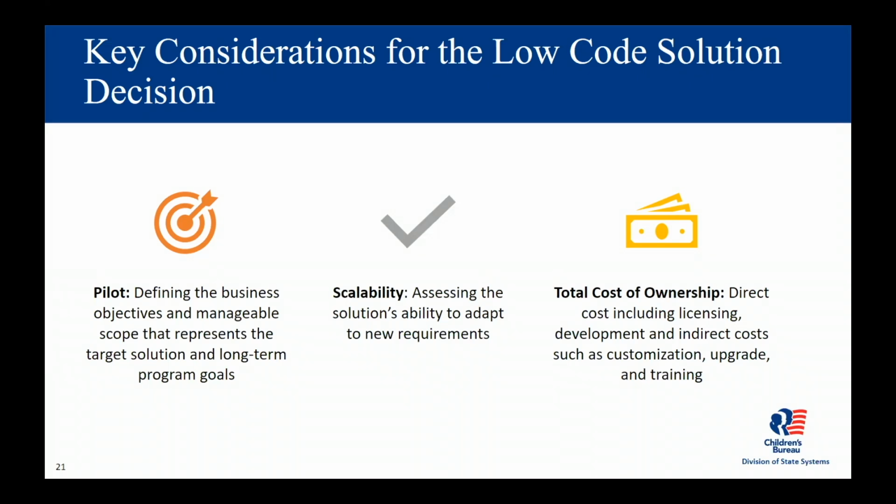First up, we will be looking into pilot project planning. Imagine you're implementing a case management or an intake module. Start small by defining a very clear objective and ensure that the scope is manageable. This approach would help us test the waters, ensure it aligns with the long-term goals and the low-code solution's capabilities. So you always test, learn, and adapt. That is a good starting point.